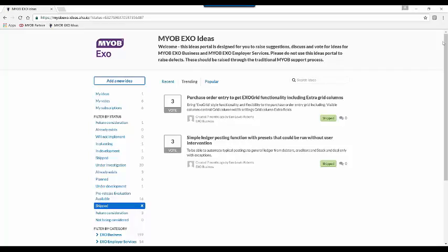Now this is fantastic because quite often people can't do this in a jobbing site. They can't accurately go at the end of a job and say it truly cost us this much, including the cost of your materials at the time, and we made this much of a profit. But not only at the end of the job can you do this with progress billing, it allows you to keep track of it all whilst the job is in progress. For example, we've got 4-year-long jobs. This is great because you could have quarterly reports running to show you where your progress invoicing is going and still capture the actuals on the job.